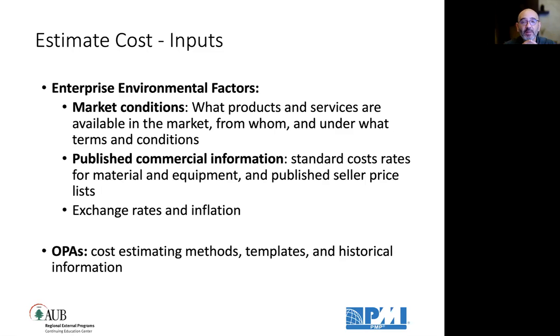Here also, for example, when we were going with PwC to Basra in Iraq, we wanted to pay hardship to the consultants who would go. In addition to the per diem, we agreed to give them hardship, because they were going to an area with war zones, problems, explosions, etc. So we started researching on published websites what is the typical hardship rate they give to consultants traveling to Iraq, and we found the average is around $200 per day. So we agreed to give anyone who is willing to go to Iraq, on top of the $60 per diem, $200 hardship.